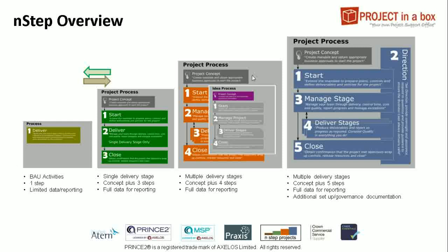So you can have a 4-step project which has perhaps an agile stage, because you might be doing some prototyping, perhaps a couple of procurement stages, and then some desk study reviews. And so you can build up your project with the project body being the same but different delivery types within it. The same goes for the 5-step, and the same, as I say, from Personal Edition, Small Team, Enterprise, Live Editions.